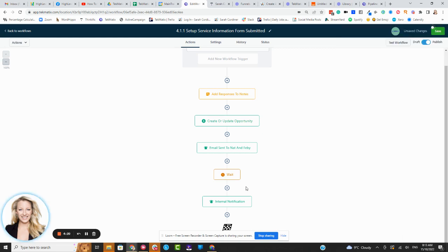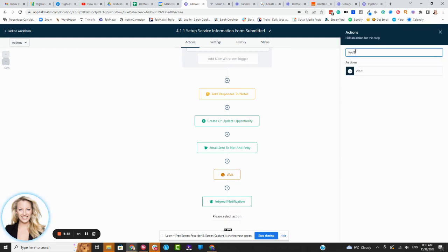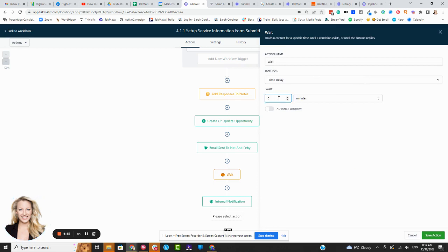All right. Then what I'm going to do is keep checking in with my team until this project has been completed, so that no job can be left falling through the cracks, so that no client's project disappears into cyberspace. We want to make sure that every project is delivered on time every time. So instead of me having to remember to check in with staff manually, we're going to use the system to automate those check-ins even more. So we've waited for 3 days. We've checked in with the staff member. Now I'm going to put in a wait period, press wait, and I'm going to wait for another day. And I'm going to just basically be very annoying to my team until this project is completed.